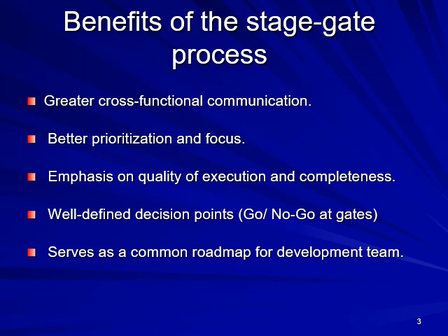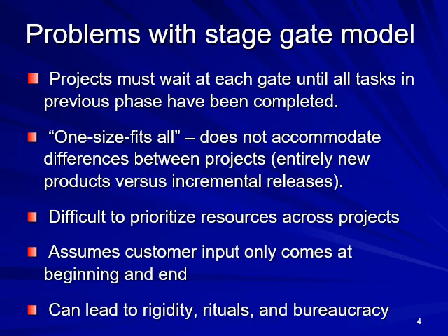What you're essentially doing, even though it's not on the slide, is you're trying to minimize the chances of launching a product that is in fact a failure. So you're trying to minimize, if you're thinking of it from a stats perspective, type one error. Now, this has a caveat, which is as you're minimizing the launching products that are not going to be doing well in the marketplace, you're going to prevent products that will actually do well in the marketplace not coming through, right? So there's a trade-off, as we will see in the next slide.